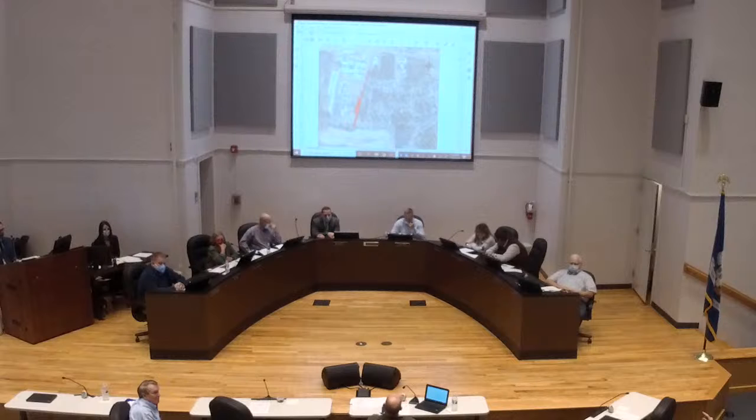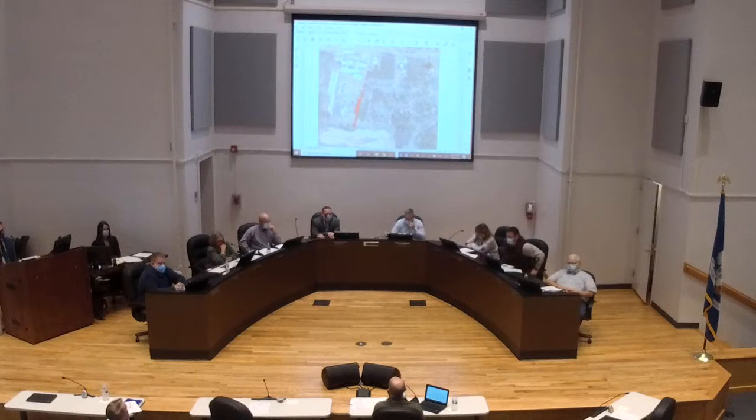Yes, sir. It's going to go around Forest Hills. There's a ditch that goes all the way around and all the way to Eastwood Bayou. The water naturally goes there right now when it goes through the subdivision. We're rerouting them around, and Curtis checked that to make sure that none of those homes are affected. We didn't want to fix a problem and then cause another problem with Forest Hills. So we increased his task order to go ahead and go all the way down to Eastwood to make sure we didn't impact anybody.